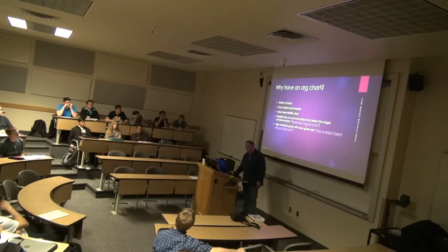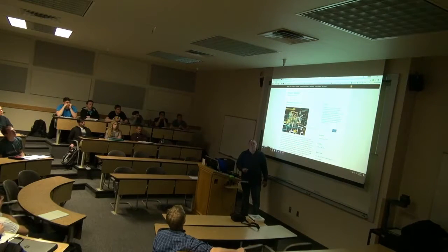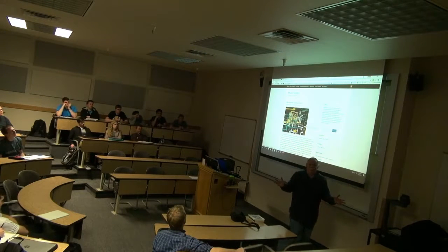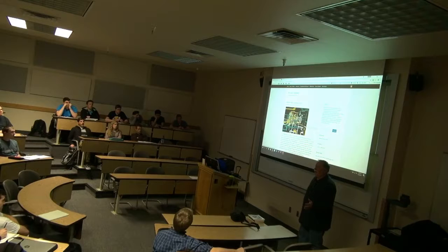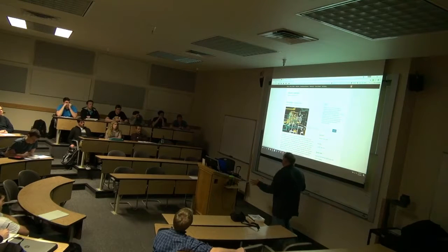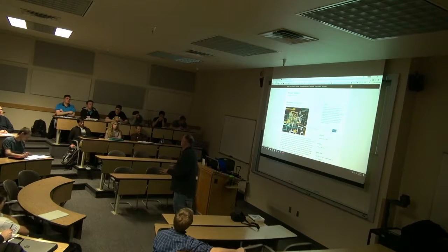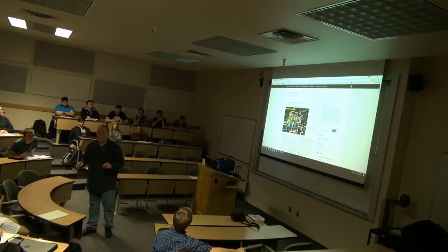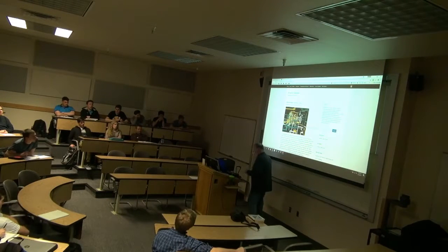I've seen this up close and personal. I have a link here to an article. I kid you not, I reviewed a project, I think I mentioned the $500 million project at Fannie Mae, and this was my mental picture of the organization and the architecture. It was just convoluted. And there was a reason why they had spent 4 years and $500 million, and they literally had no code that could go into production. None. So with your org chart, you want it to reflect the lines of communication to reflect what you're trying to accomplish.